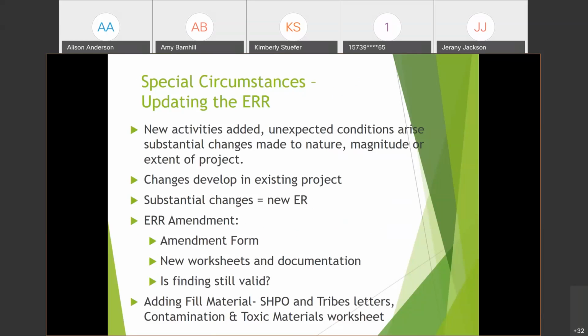Special circumstances for updating the ER are when you have new activities that have been added, unexpected conditions that arise, or substantial changes made to the nature, magnitude, or extent of the project. So this is when changes develop in the existing project. Now, if there are substantial changes, you could have to do a new ER. With the ER amendment, there is a special packet, and there's an amendment form. There are new worksheets and documentation that need to be done.